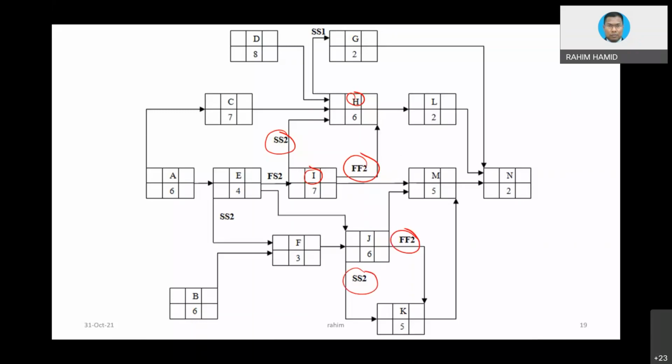Microsoft Project does not accept redundant relationships. Redundant relationship means you have start to start at the beginning, and then FF. Which one do you really like to use, in other words? So please decide. Microsoft Project only decides on the dominant one.